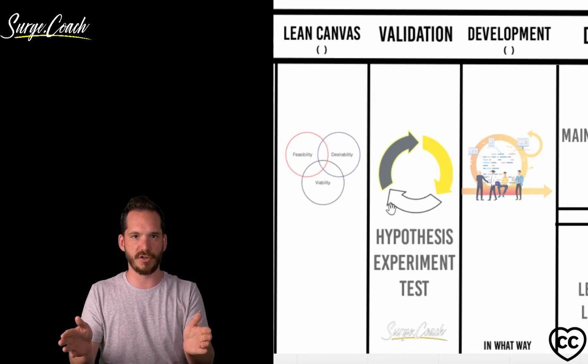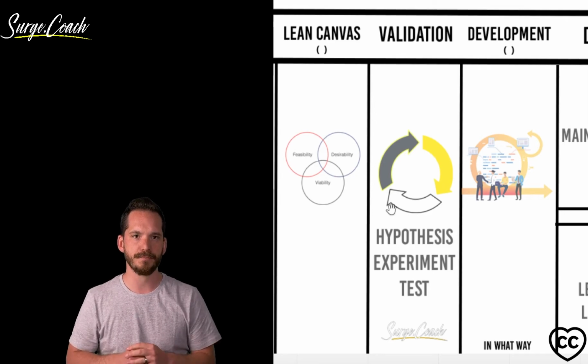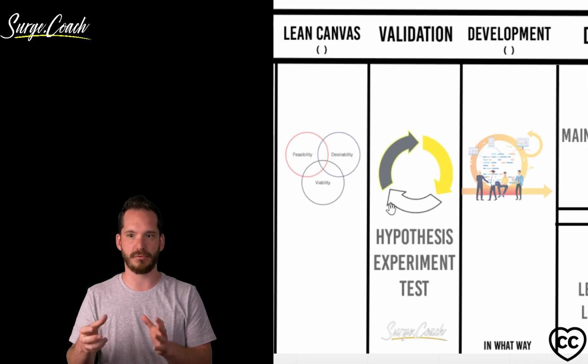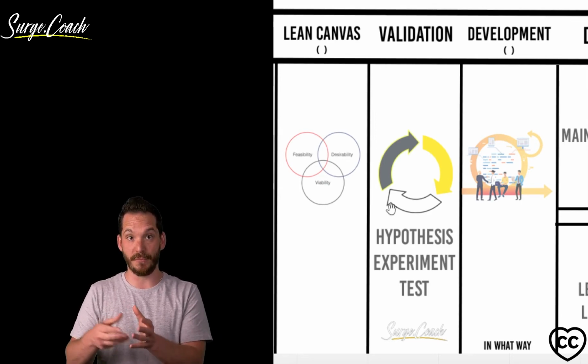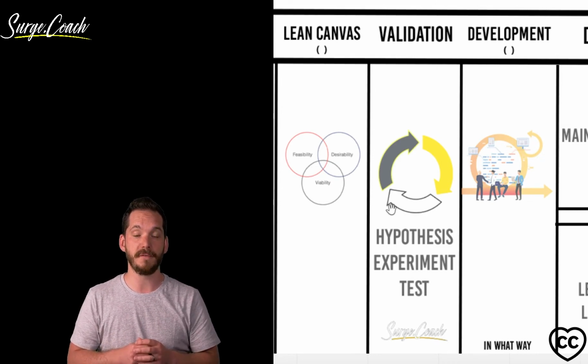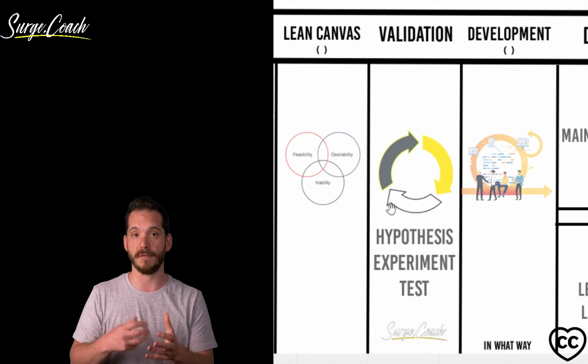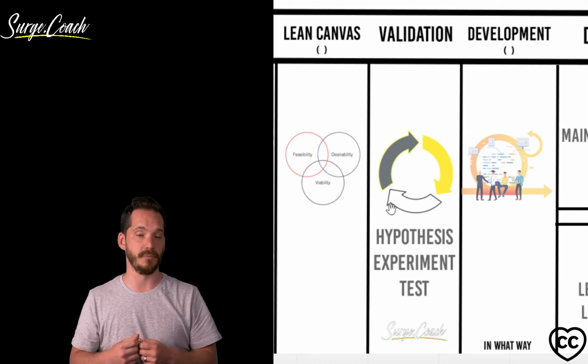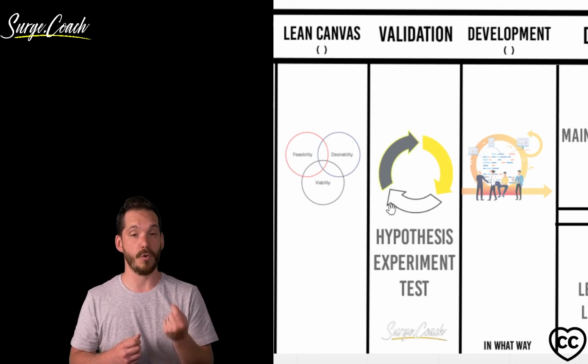So for a large project that could take 6 to 9 months, you may do a 2-week sprint to understand if this project will actually get the benefits that you think will happen. So it's all about validating your hypothesis here. Preferably, you'll go from a research point of view and create some hypotheses and go out and test with customers, and the customers will basically tell you that this was a bad or a great idea.